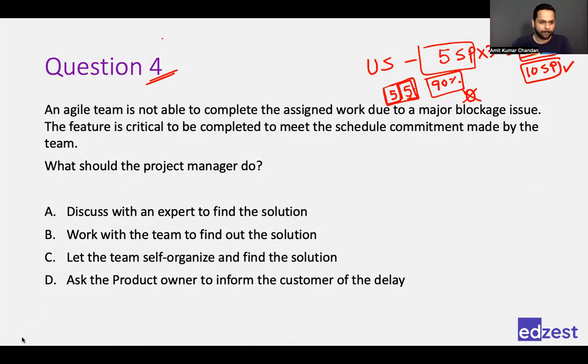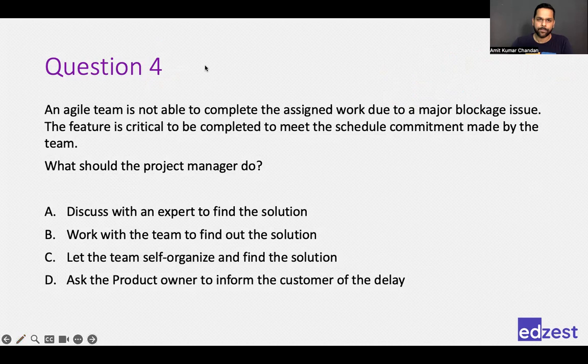Clear, Kamal? Okay, so it is per the story points, per the task that we have completed. Yes, absolutely. So if there were 10 tasks related to a user story, you completed 9 tasks but have not completed 1, that user story is not complete. If it is not complete, you cannot take any story points from it. It is 0. Okay, so globally it is not affected. Globally it is not 0, it is only for that user story. Yes, for that team and for that user story. Okay. Thank you.